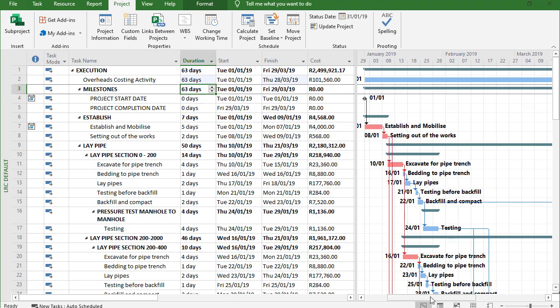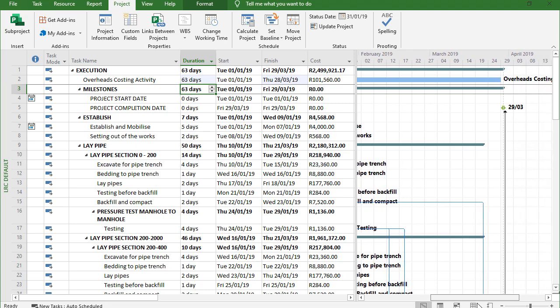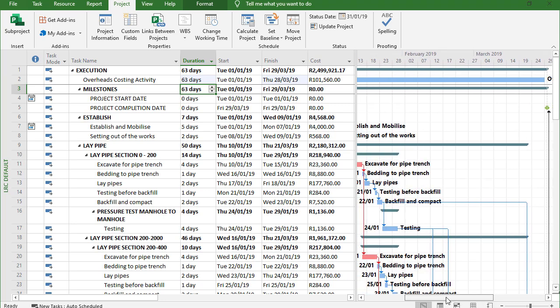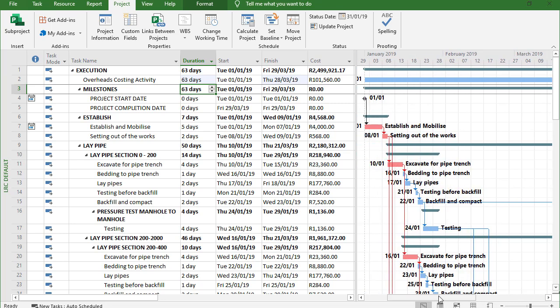And the same thing goes with the completion date. So if completion takes longer and as it expands, I would like to see the impact of that on my costing activity. And that's one of the reasons or one of the instances where a hammock activity becomes immensely valuable because that will simply give us the answer and provide us with the dynamic activity at all times.